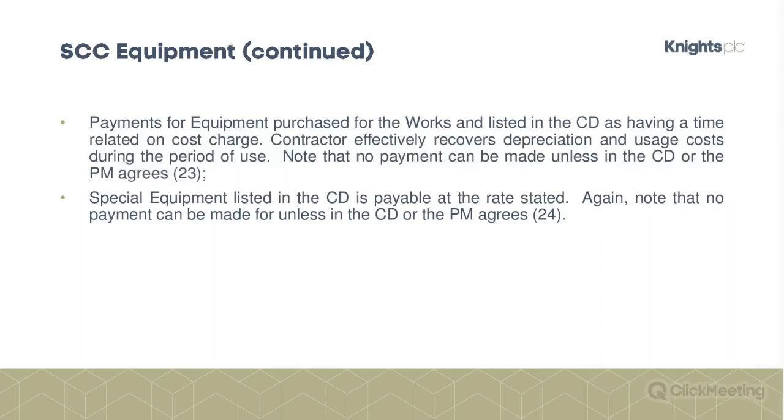Also, the special equipment, again, this would be listed in the contract data and payable at the rate stated in that. Now, with those two, please do note that you won't get paid them unless they're either in the contract data or the project manager agrees to them. So you need to think ahead.